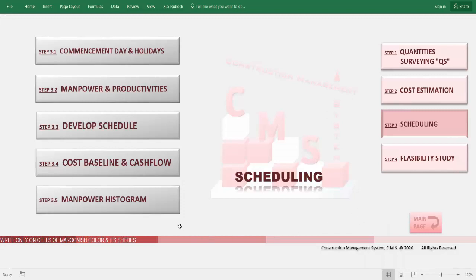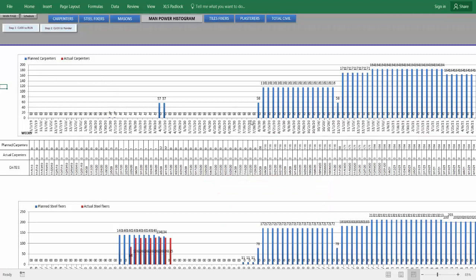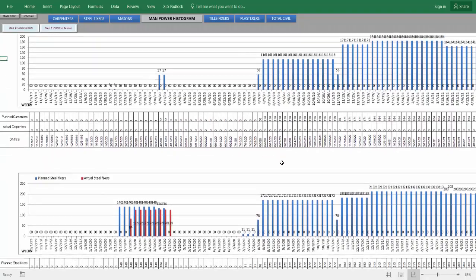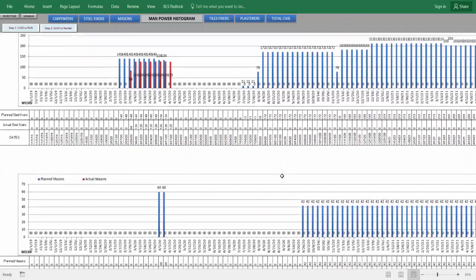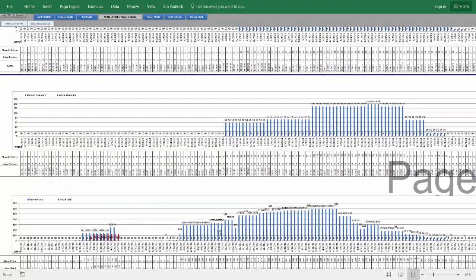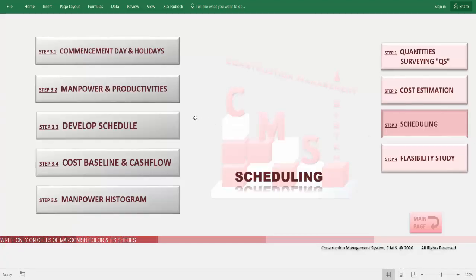CMS also produces the required manpower histogram, allowing you to know from the beginning of the project what civil manpower is required — carpenters, steel fixers, masons, tile fixers, plasterers — and the total civil manpower. It gives a full histogram showing the amount of manpower and the timing of deploying and demobilizing them, all automatically. This allows you to know the capacity your company needs to execute this type of project.